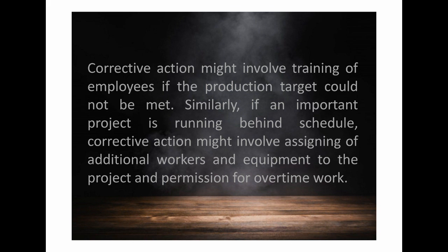So what are the corrective actions which are taken? Corrective actions may include training of employees if the production target could not be met. Similarly, if an important project is running behind schedule, corrective actions might involve assigning additional workers and equipment to the project. Not only this, but also permission for overtime work. So this is very important. If the production target is not met, obviously the employees will have to be trained.